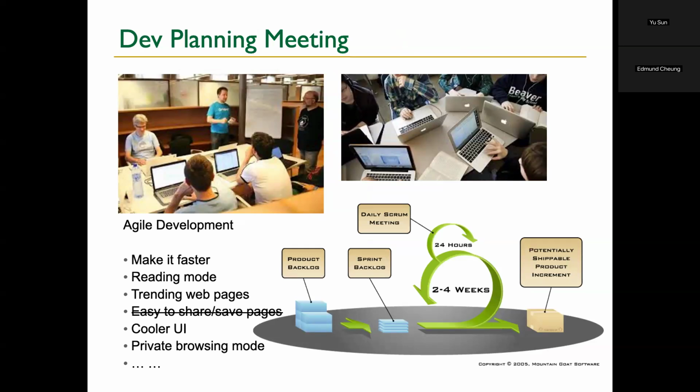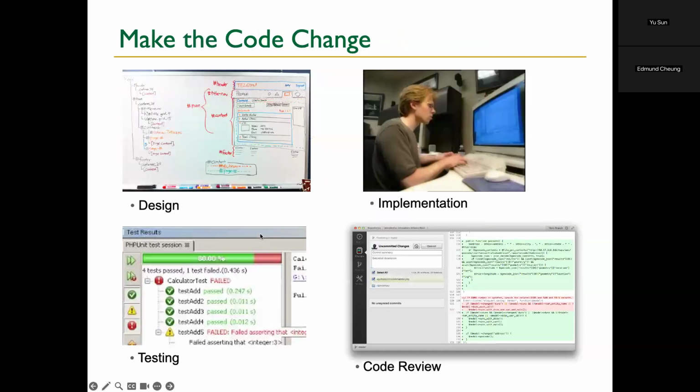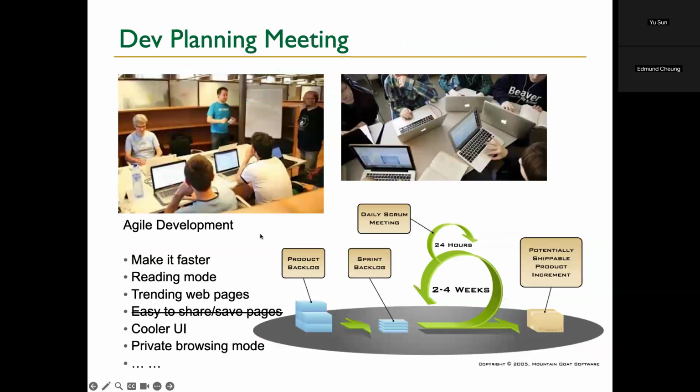So all the developers, software engineers, start to work on this. And here we're going to very briefly introduce something called Agile development. Basically, the developers all follow a pattern of small cycles, because this project is for the whole year. So how do we manage that whole year very effectively? We normally break it down into smaller cycles. Every cycle, for example every month, we have some goals, things we want to finish, and then we do that incrementally with different iterations. That's a very common way. That whole process is called Agile. We'll talk about that in more detail.